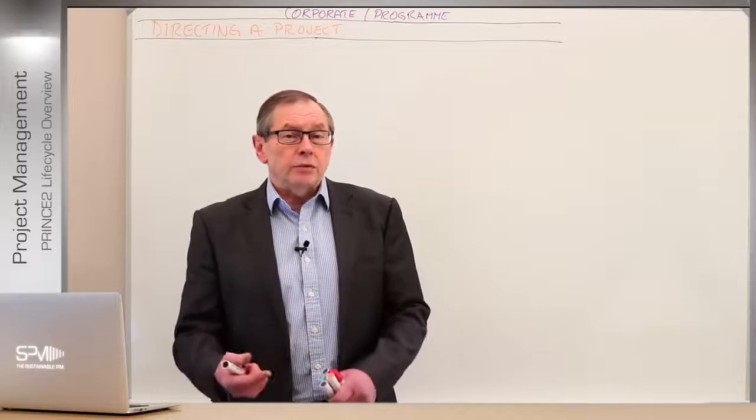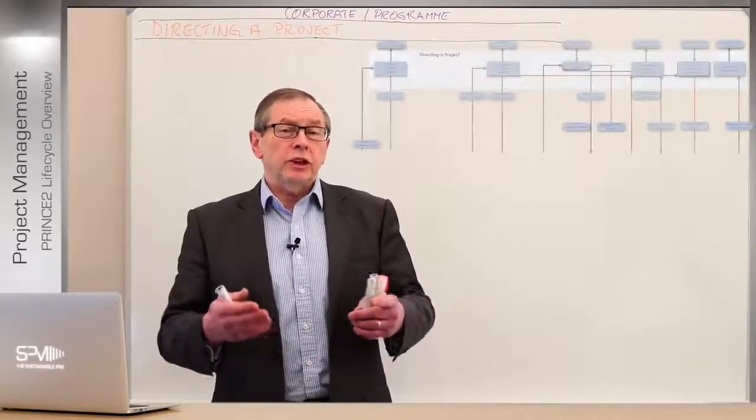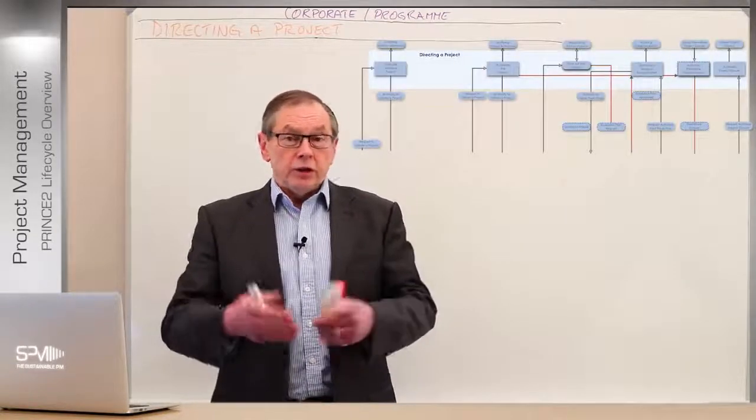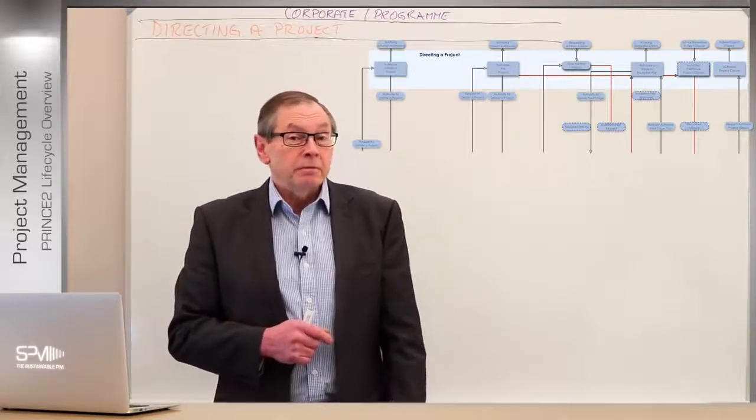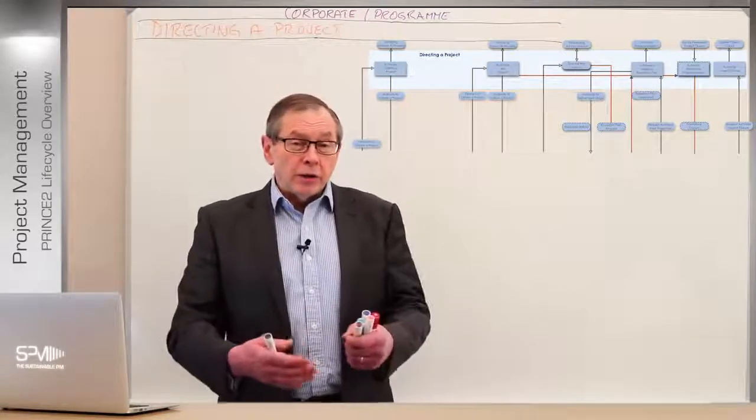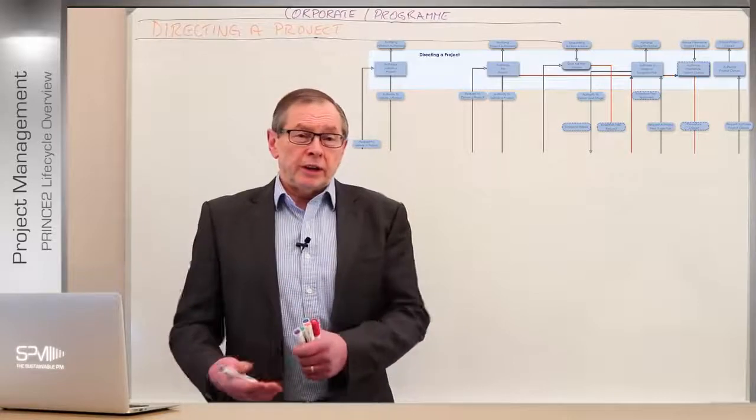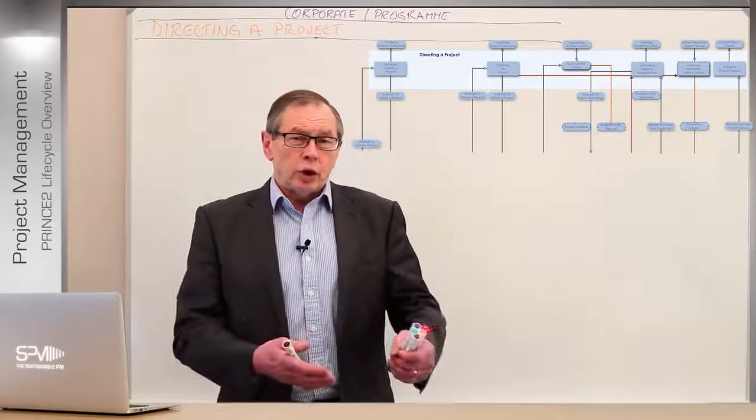And we do that in the stage boundary. The stage boundary marks the end of a stage. That's what they call a boundary, strange enough. And at that point, we update everything, and then we plan to go on to the next bit. That's what we're doing, really, that boundary. We've marked all the work during that stage.